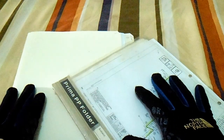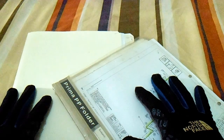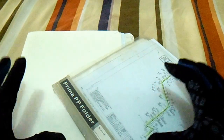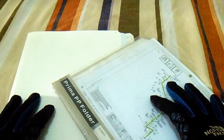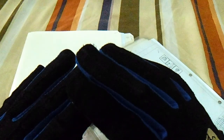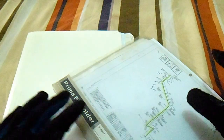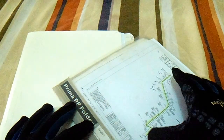How to satisfy or release for testing this test package. First, the line shall be completed based on the isometric drawing and based on the test limits from the P&ID. The line shall be completed.